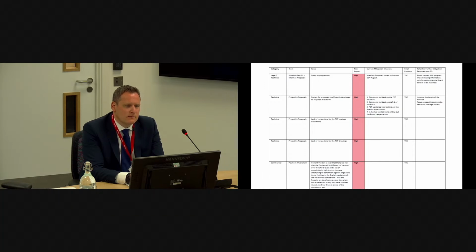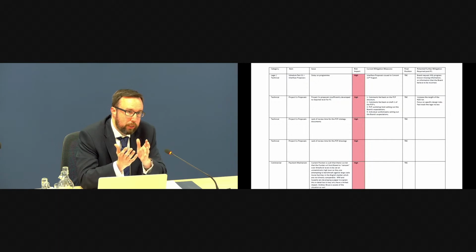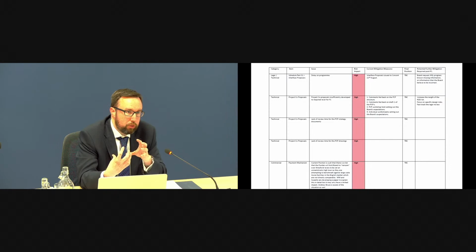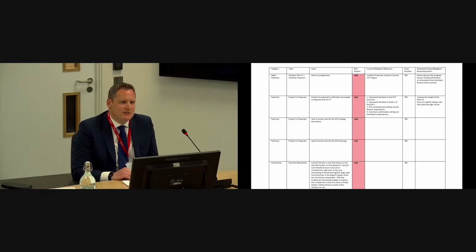And again, for those of us that don't work in the space, if you've got a lot more reviewable design data than you'd anticipated, what are the potential problems and risks arising from that? Ultimately it's lack of clarity for Project Co to progress the construction. So there's programme and cost risks. And what was your understanding? Why was NHS Lothian content to undertake that increased risk of the greater volume of reviewable design data? I think it's probably better for NHS Lothian to comment, but I can imagine they were at a compromise. There was a lot of pressure to push to get to financial close. The delays in the project, so I can imagine there was pressure, and therefore they were open to compromise about how we could get there.